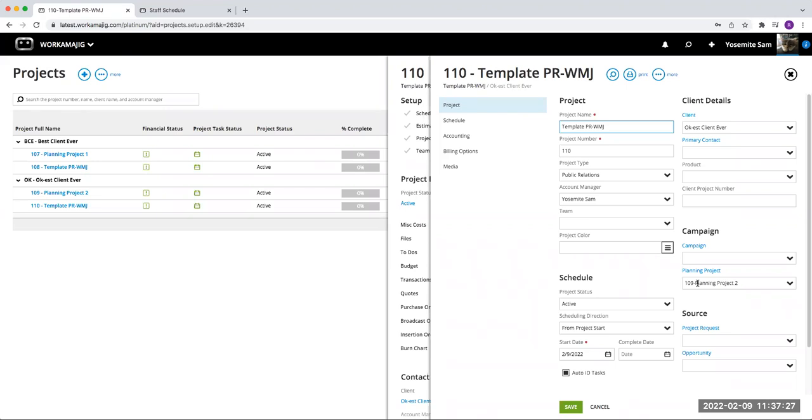So there are the same features and same functionality whether you're using people or service, except for how you plan on allocating that work out. There are two different methods here. My people will be putting their time against the planning project because they're working those 8 hours of account management a week. That's more of a bucket, versus I just want to plan ahead to know that this client is going to use 20% of my account manager's time. I don't know who that account manager is, I just know it's 20% of their time. And then when we do know which account manager will be doing the work, we can use those allocations as they come across.